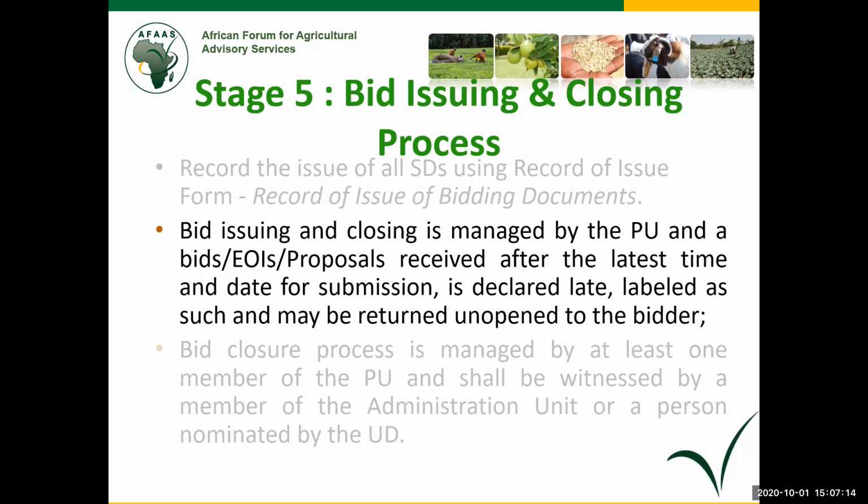If it was a manual system, we would return them unopened. But because we use soft copies, we debrief them after evaluation that your bid was not among those evaluated because it was a late bid.